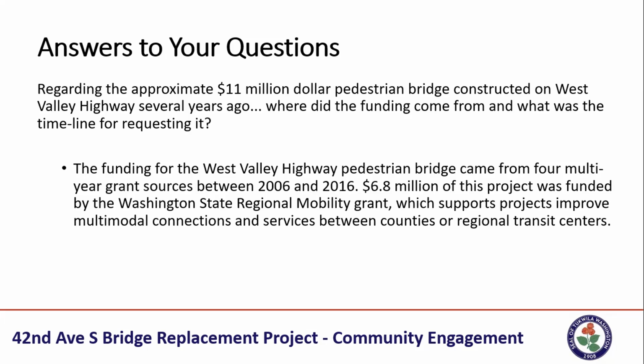$6.8 million of this project was funded by the Washington State Regional Mobility Grant. The mobility grants are only granted to bridges and trails that are non-motorized, so these are specifically meant for bicycles and pedestrians. These funds are set aside. They are not interchangeable for vehicular bridges. They're separate.